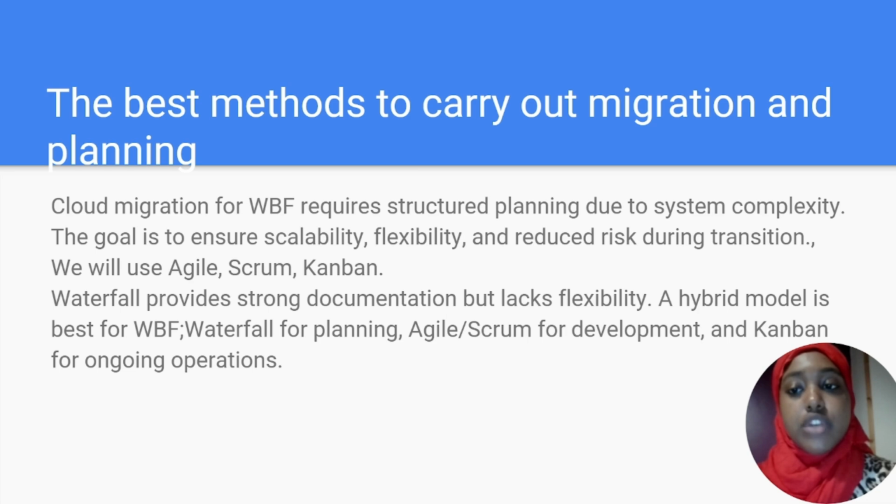Scrum is a popular agile framework that provides a structured implementation of agile principles through defined roles, events, and artifacts. This structured approach allows for WBF teams to regularly inspect and adapt their progress, making it suitable for cloud migration projects or complex systems where understanding is developed over time. Similarly, Kanban supports continuous flow of delivery by visualizing workflows and limiting work that is in progress, which helps teams quickly respond to changes in goals and identify bottlenecks. Kanban methodology is useful when managing complex systems with continuous delivery requirements.